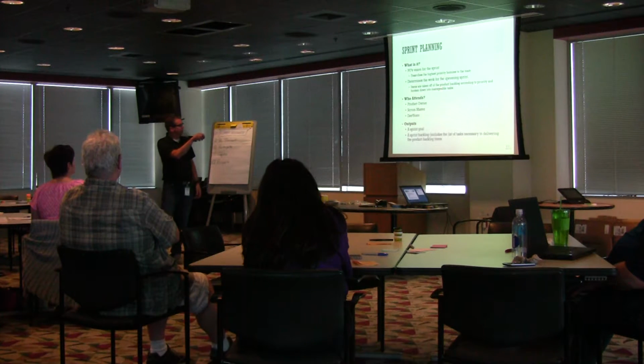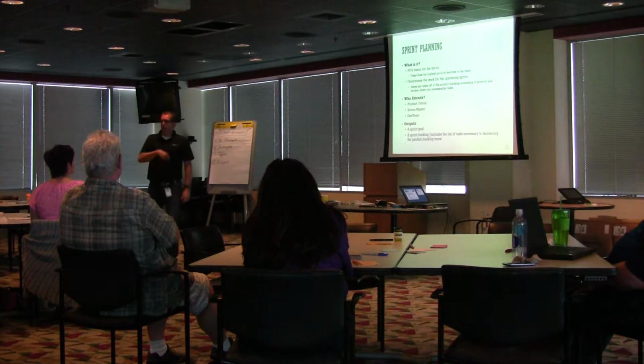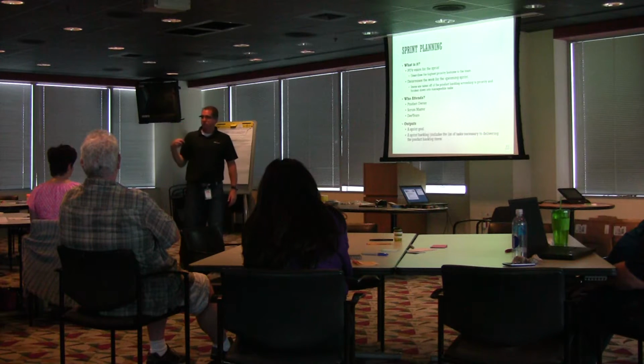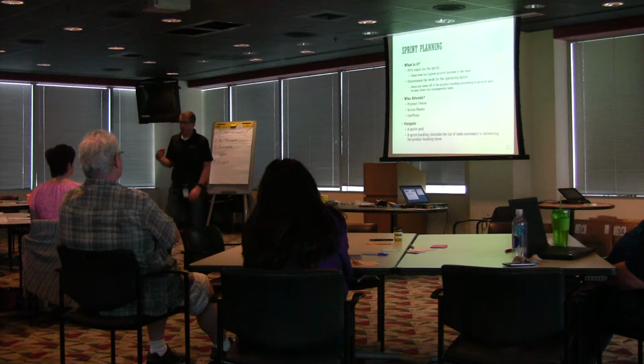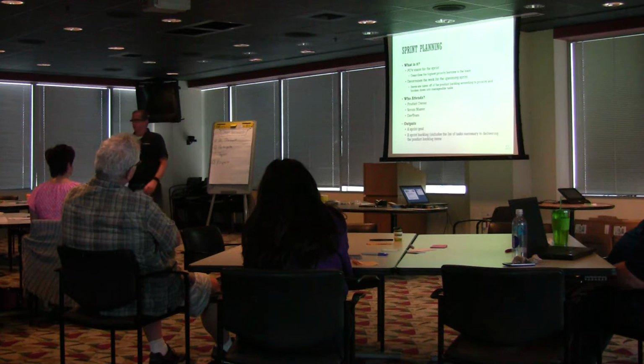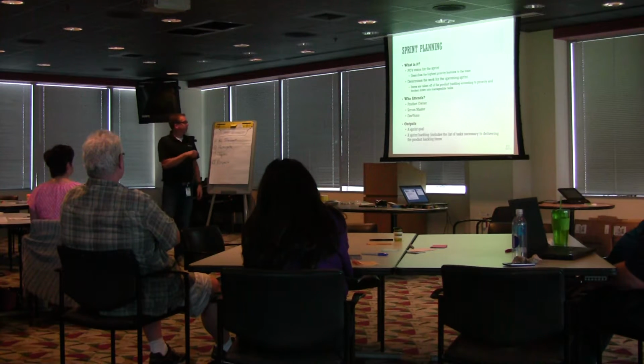They might break it down to manageable tasks. So I've got to build a screen with these fields on it. I've got to make a call to the database and bring back information, if I had a match on the username concept. If it errors, I display this. If not, I let them in the system. So those might be separate, disparate tasks that I might articulate.